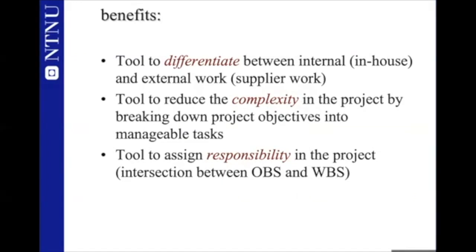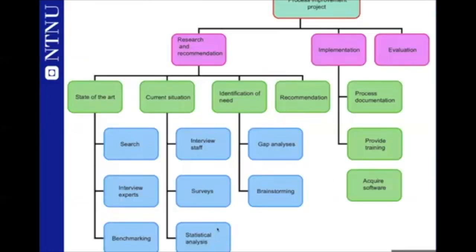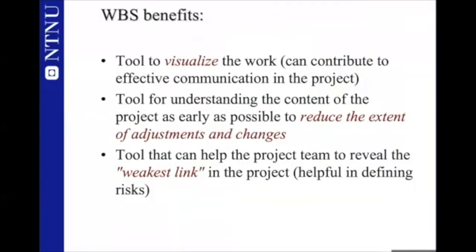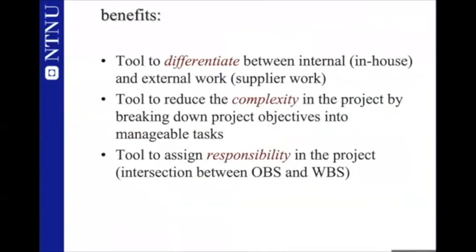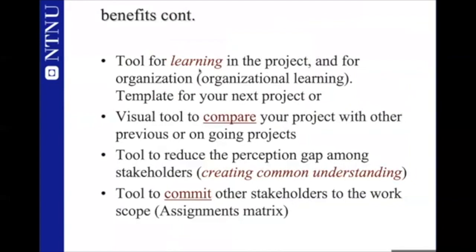You can as well create a responsibility matrix, in the sense that you can go here and say, well, interview staff, Fatima will be doing that. Surveys, Ina will be doing that. Statistical analysis, Harry will be doing that. And Faiza will be doing that. And Howard will be doing that. So it's immediately easier for you to say who will be doing what, which will reduce the level of conflicts at the end. And this is perhaps, I think, important. It's a tool for learning.